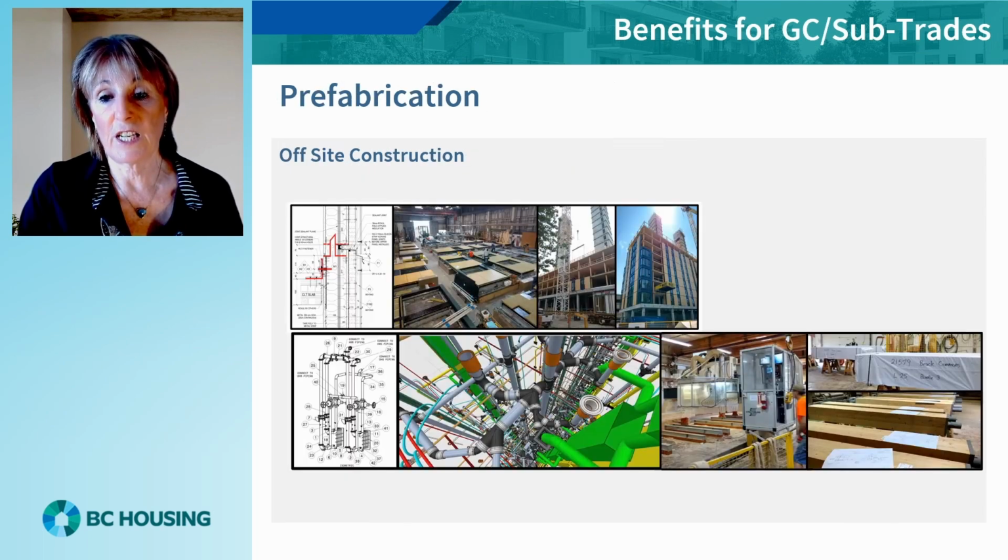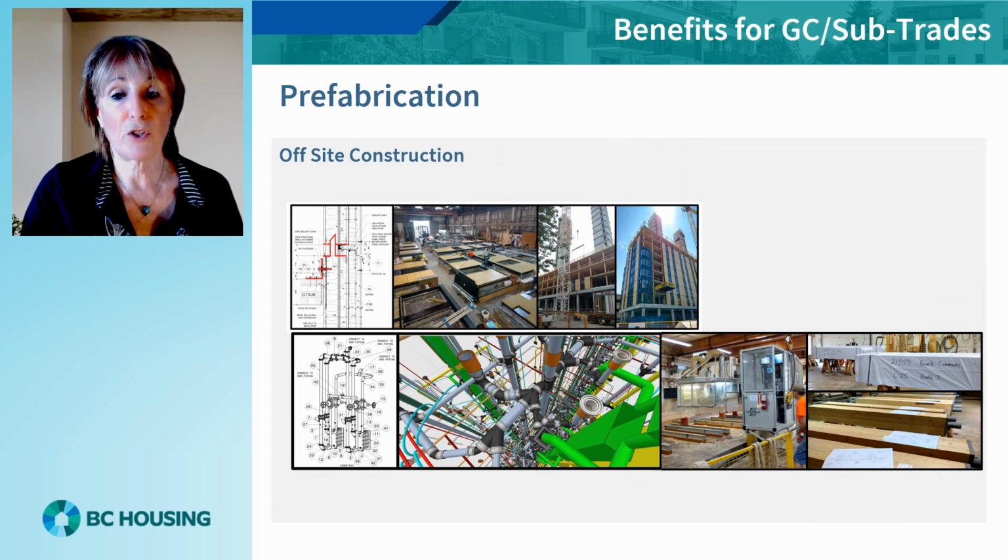BIM facilitates a more efficient prefabrication process by empowering off-site construction methods and prefabricating components using digital models. This process leaves the construction site clear for those that must be there. Prefabrication increases the quality and reduces the install time on site. This streamlines the construction process, taking it a step further into an industrialized approach and promotes waste reduction.